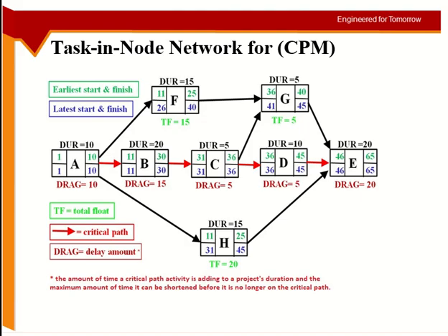Okay, so moving on. In the same way, you will go to activity, so I'm jumping now, you go to activity E. So this one finishes at 40. This one finishes at 45. This one finishes at 25. So if I go with 41, I will break this arrow and this one. If I go with 26, I'm breaking this rule. So I have gone with 46. So all three are satisfied.